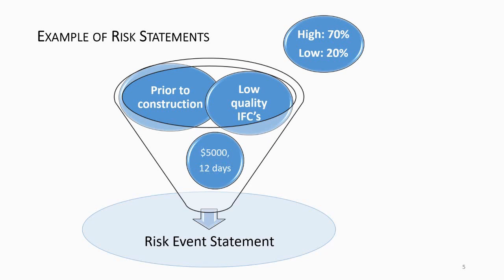So that's basically the structure of the risk statement. I've got the event, the date, the impact, probability, and then I attempt to quantify the impact a little bit further.